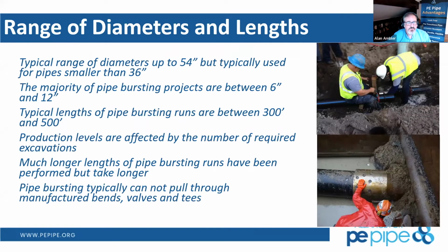So when we design pipe bursting projects or look at the layout of them, we want the crew to be as productive as possible. So we're going to look at the number of connections, the number of pits that need to be looked at or opened up to perform those connections, and then that will limit a productive day for us.